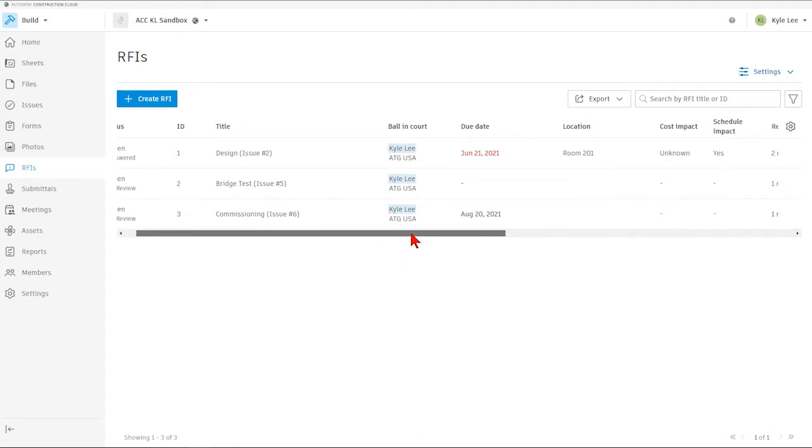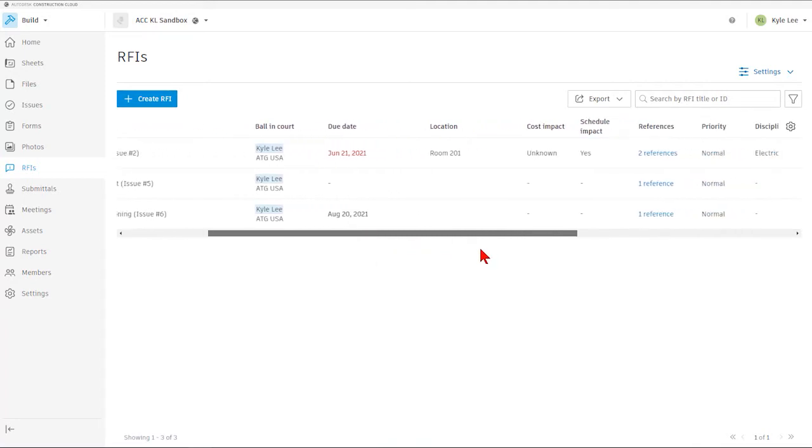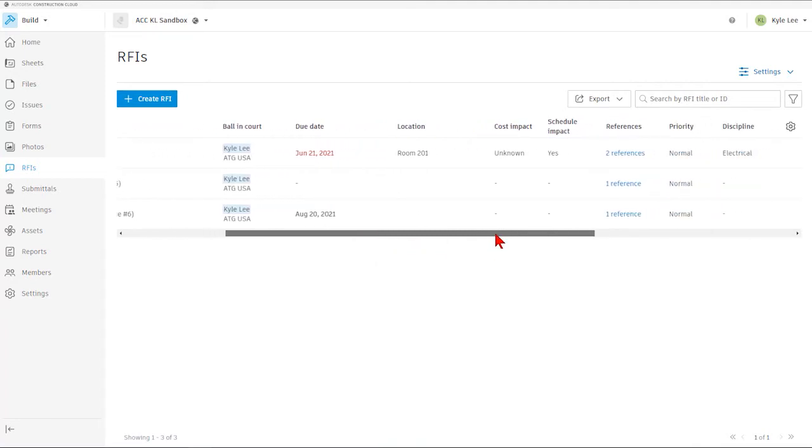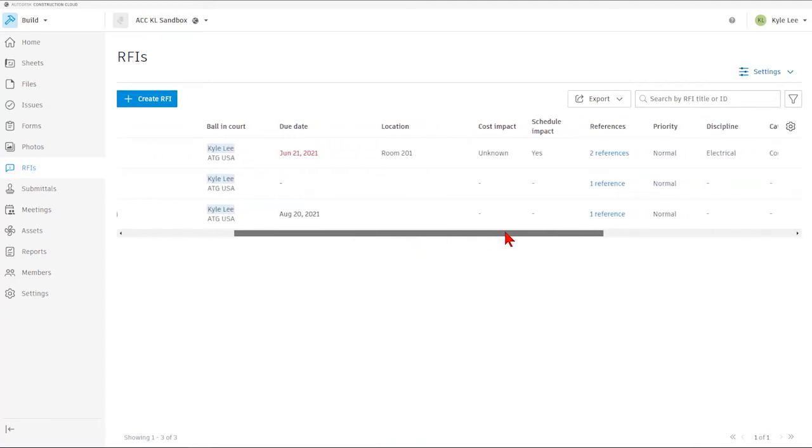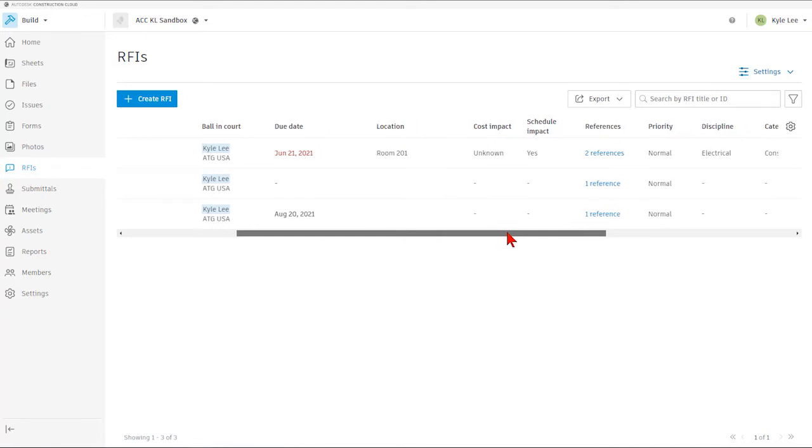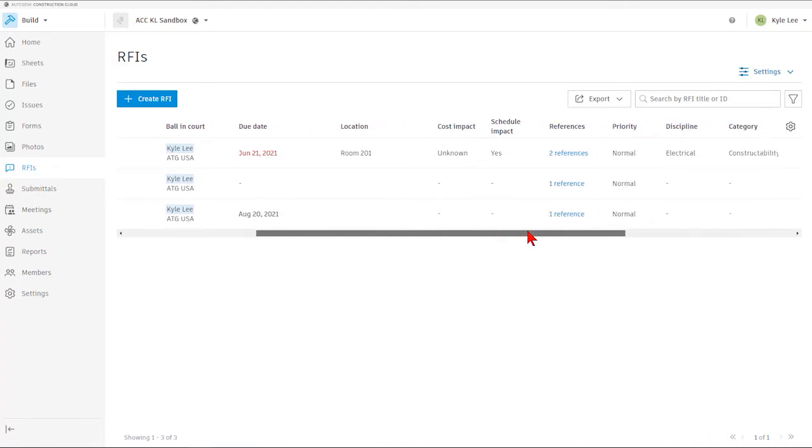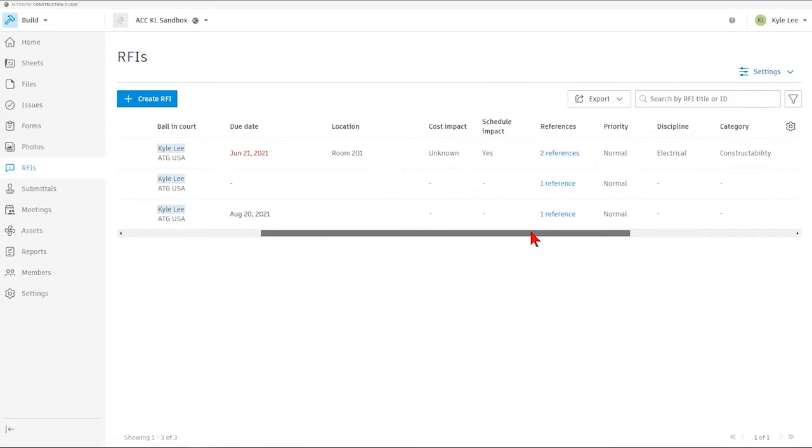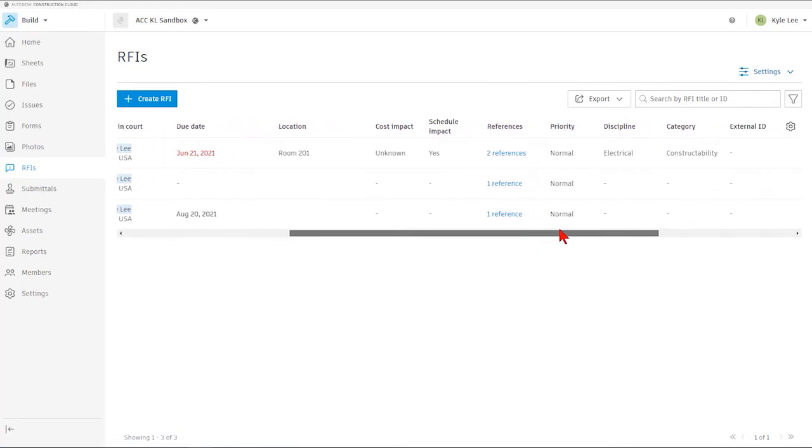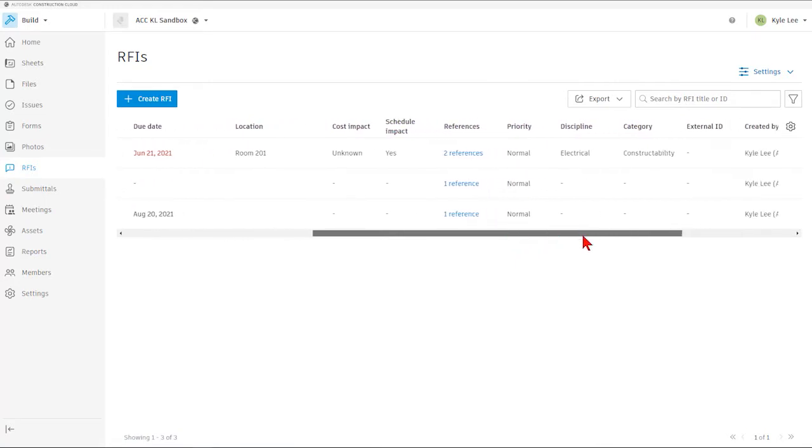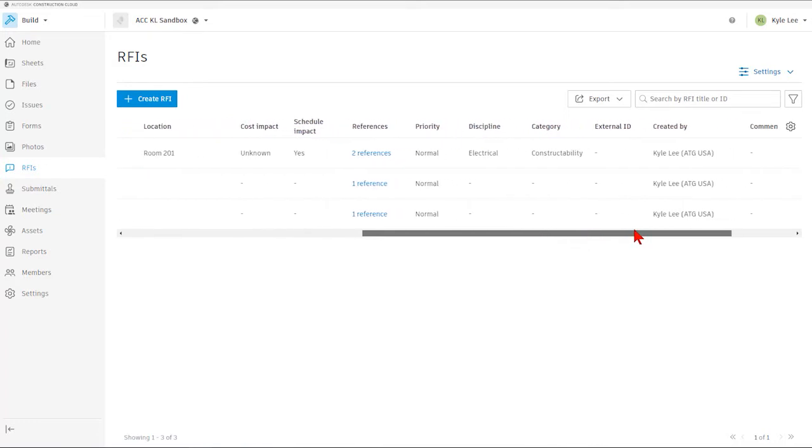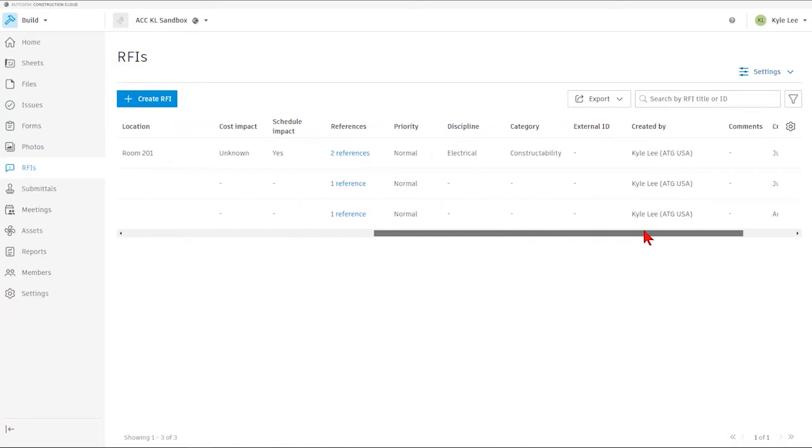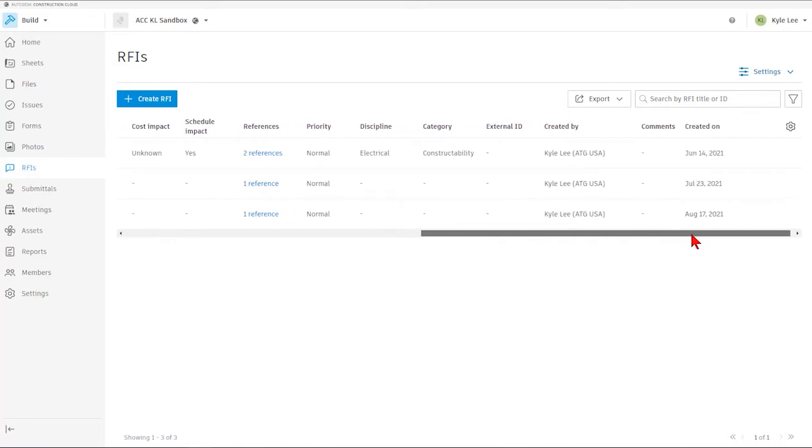Also, we can see who is the responsible person with ball in court, waiting for their move to progress the RFI through the process. We can see the due date associated with the RFI if that's been input, as well as any of the location data, potential cost or schedule impact, and we can see the number of references into each RFI.